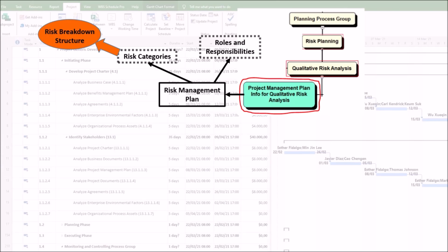To use an RBS is important because you avoid the apples and oranges problem. You're not comparing a technical glitch to a budget cut in a disorganized way, you're analyzing each risk within its proper context, which leads to better risk management decisions. A standard RBS is usually hierarchical, looking something like this: Level 1, the category, or the bucket. Level 2, the subcategory or the specific source of risk within that bucket.